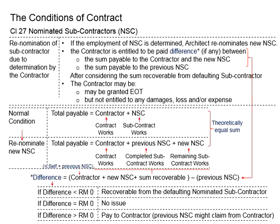When the renomination of the subcontractor happens, there will be a transition period for the original nominated subcontractor to vacate the site and hand over possession, so that the new nominated subcontractor can join in. This might result in a delay of the work. As a result, an extension of time shall be granted. Regarding the monetary losses related to any damage, losses, or expenses as a result of the defaulting subcontractor, these shall be recoverable from the original nominated subcontractor by the contractor.